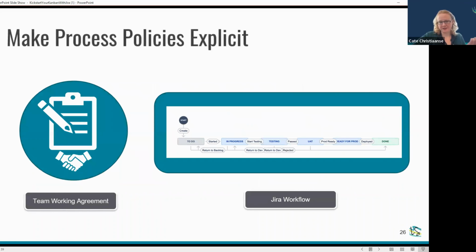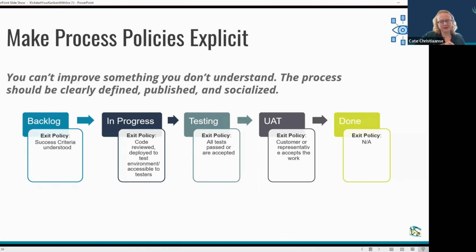And one thing I like to share as an example for this particular one is on many of the Kanban teams I've been on, the first open question is when something moves from in progress to testing, does the developer just move it to testing to mean it's ready for test, but it's not in QA, or does it mean it's actually available for the tester? That is usually a very exciting nuance that we work through pretty early on. Right. But again, it's a shared understanding. I'm ready to test it. I tested it. It still fails. Oh, we haven't updated the code in that environment to test. Exactly. Both sides assumed something different. Both were right and wrong at the same time. So this helps with that explicit understanding.